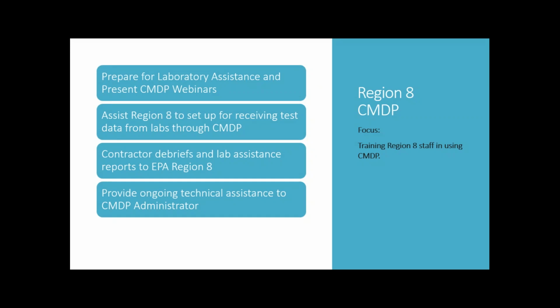To round out on Minnesota, the thing that also happened at the end was that this wonderful list of must-haves went to MNIT and was immediately greeted with "too much, still need to downscale." So I think another lesson that is going to permeate through both of these projects is the need to be flexible and adaptable, because we're likely going to be coming back to Minnesota to do one more facilitated meeting where we can shrink that list even further.